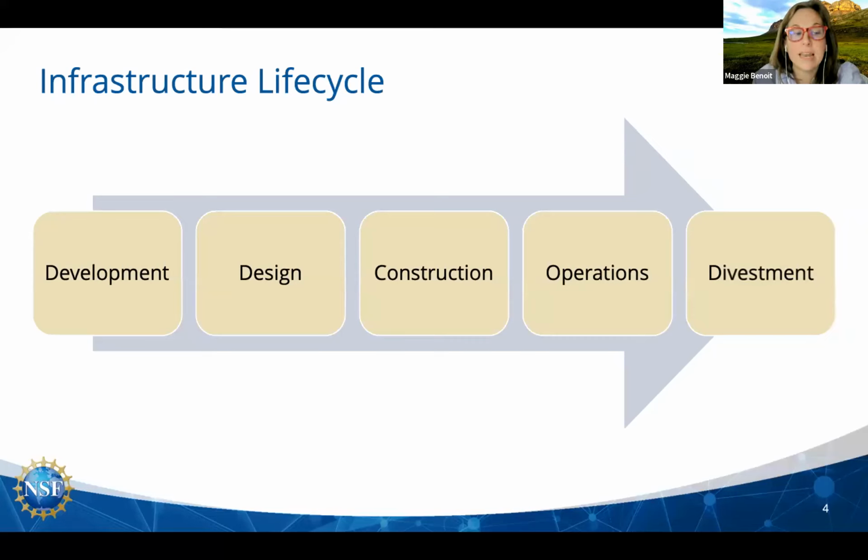The design phase is next. And so this is where detailed, construction-ready requirements for scope, schedule, budget, risk analysis is done. So at the end of the design phase, projects should have very well-defined plans for then that would be used in the next phase, which would be the construction phase. So in the construction phase, this is when funds are obligated to construct, acquire, develop that physical infrastructure.